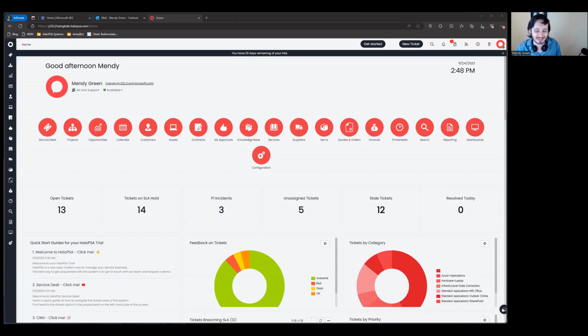One of the ways is a prepaid block. Basically, very simple. You quote out a project, a 10-hour project. You spend 15 hours on it. Your 10 hours is billed up front, and you already got that labor paid, and the 5 hours is paid at the end. Overtime is billed on that project. Another way you could do this is a fixed fee, where you estimate the project is 10 hours, you bill 10 hours, and you either do it in 10 hours or less and you make money, or you do it in over 10 hours and you don't make money on that project.